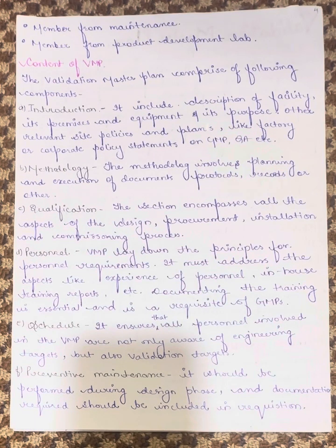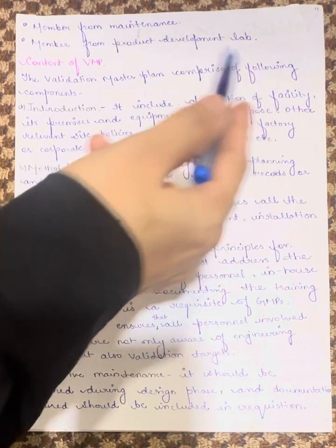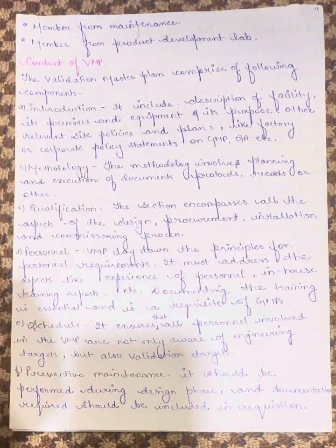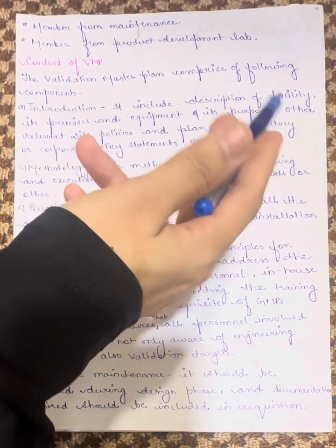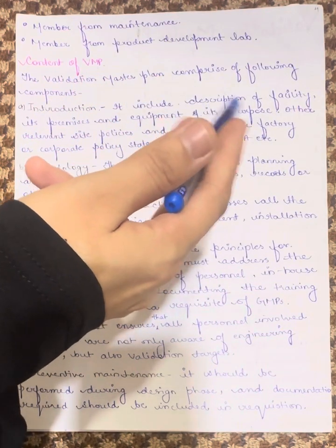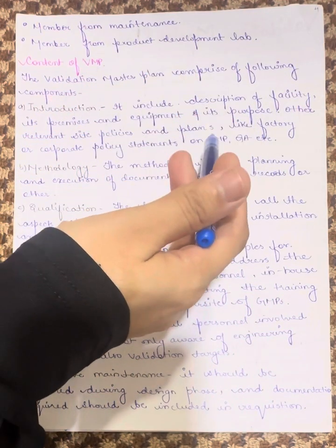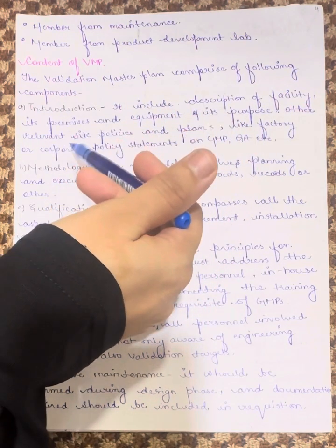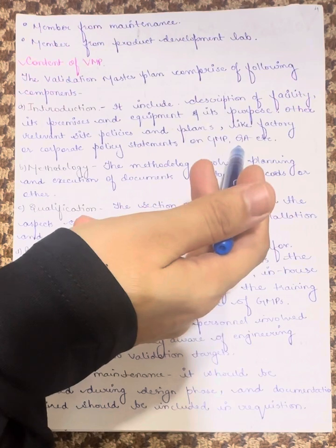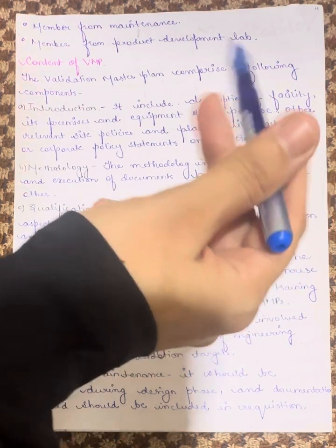Now let's see the content of the Validation Master Plan — what headings are included. The Validation Master Plan comprises the following components. First is the introduction, which includes description of the facility, its premises, equipment and purpose, and other relevant site policies and plans like factory or corporate policy statements on good manufacturing practices, quality assurance, etc.